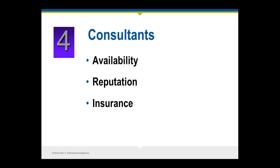You want to look at consultants. It's important to remember that if you're the prime designer, you have what's known as vicarious liability for the consultants you retain. It's very important to analyze past experience with a particular consultant. Is this a firm you've worked with before? Were you happy with their work? Did you respect each other? Did things go well? That represents a much lower risk than if you've had problems with them before. What's the availability of qualified consultants and what is the consultant's reputation? Have they done these kinds of projects in the past? You also want to very importantly make sure your consultant has adequate insurance.